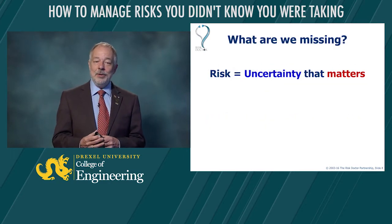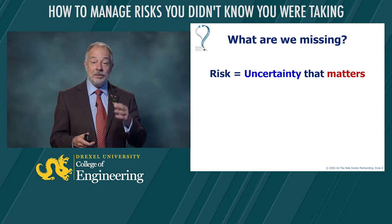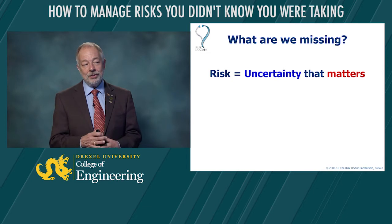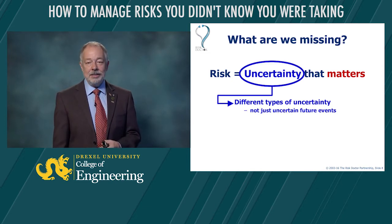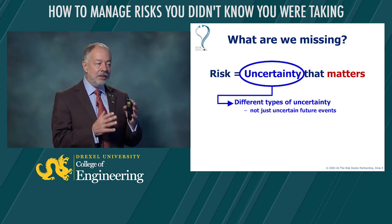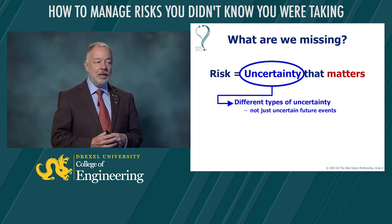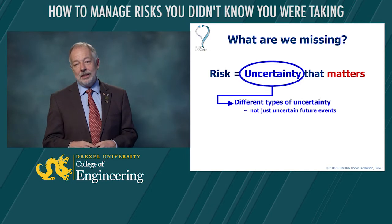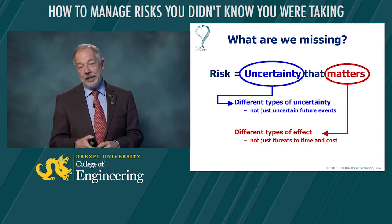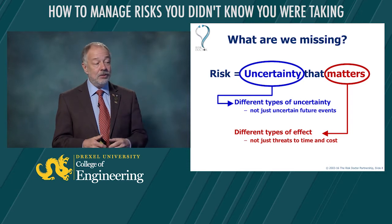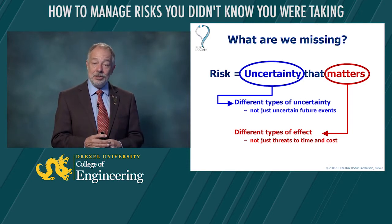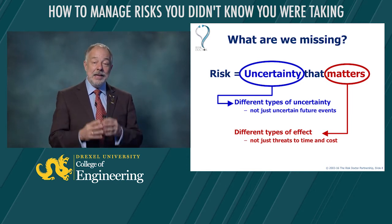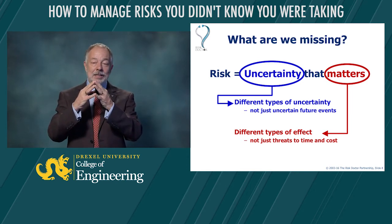So what are we missing if we think that all risks are only threats — uncertain future events that could have a negative effect on our project budget or schedule? On the uncertainty side, we're missing the fact that there are different types of uncertainty, not just uncertain future events. And on the mattering side, we're missing the point that things matter in different ways, not just bad things that could happen to our time and cost. So we need to expand our thinking about types of uncertainty and types of mattering.